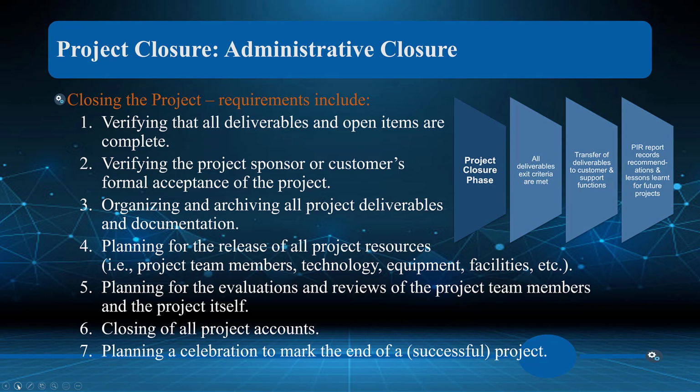Okay? So, planning for the release of all project resources, basically turning all that over, planning for the evaluation and reviews, again, audits of the original project plan to what we delivered, analyzing project team members, were they contributory? Remember that if a team member left mid-project, we also want to make sure to do an analysis of them, because they might be coming back to the organization and working on another team. So do we want them on another team? What are their assets for another team? What are their deficits on another team? And that includes everybody that was part of the team.